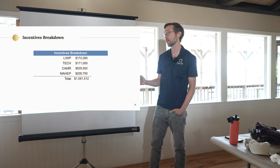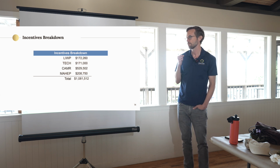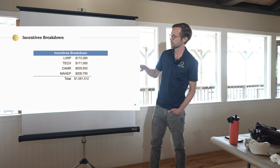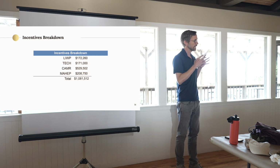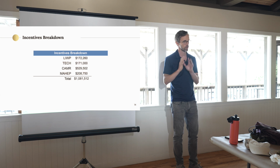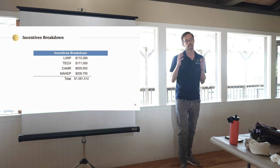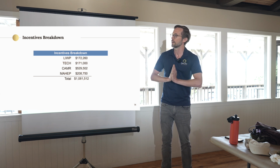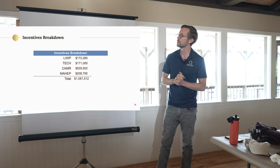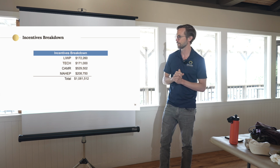And then MAHAP, which is a South Coast Air Quality Management District program, they put together an electrification program as well. So it's almost like when we do these projects, where we stack all these incentives together, each of them has their own timeline, each of them has their own requirements, each of them is their own stakeholder, and we need to manage them. It's like having 5 customers at once, kind of. We move the project along and keep everyone apprised as various things come up during construction projects. So it's always an adventure, a lot of fun.